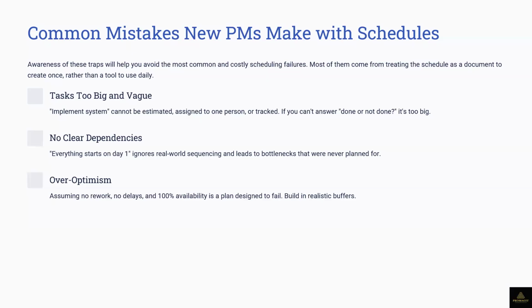It reduces it, but the implication is this: the resources on activity A will no longer be available for activity B, because the activities are now running in parallel. So most of the time, the organization will now have to employ new people for activity B.